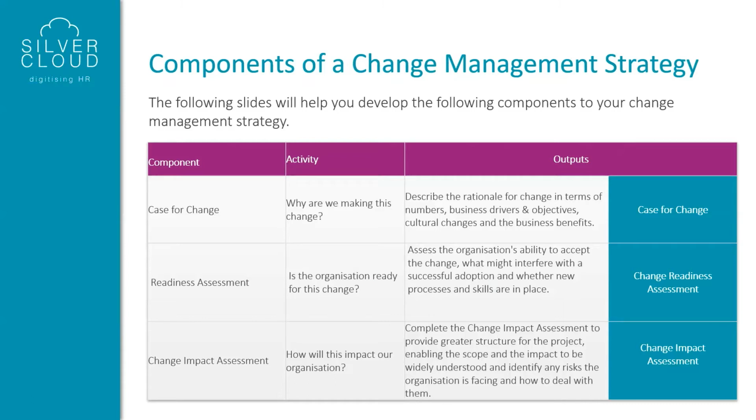Conduct your change impact assessment. How will this impact our organisation? You should complete this to provide greater structure for your project, enabling the scope and the impact of the change to be understood more widely, and the identification of any risks to the organisation that you could be facing and how you plan to deal with those. It is key that you think about your change management strategy and how you plan to do this.